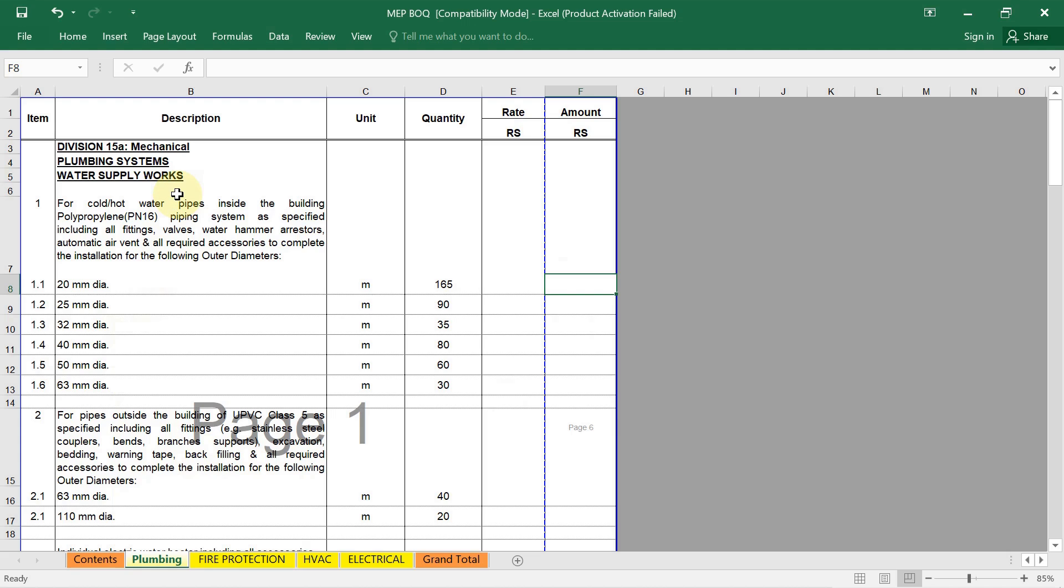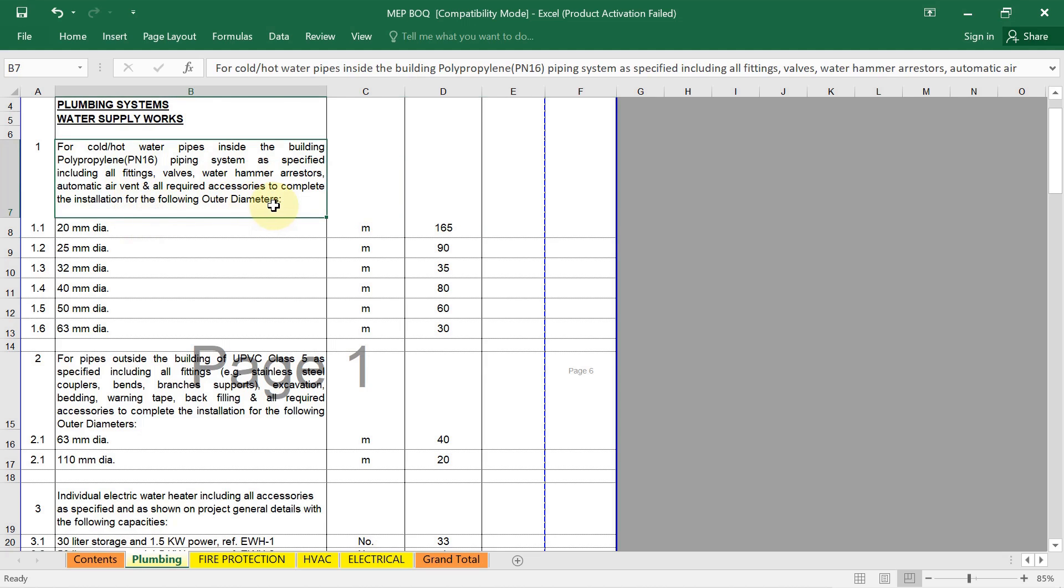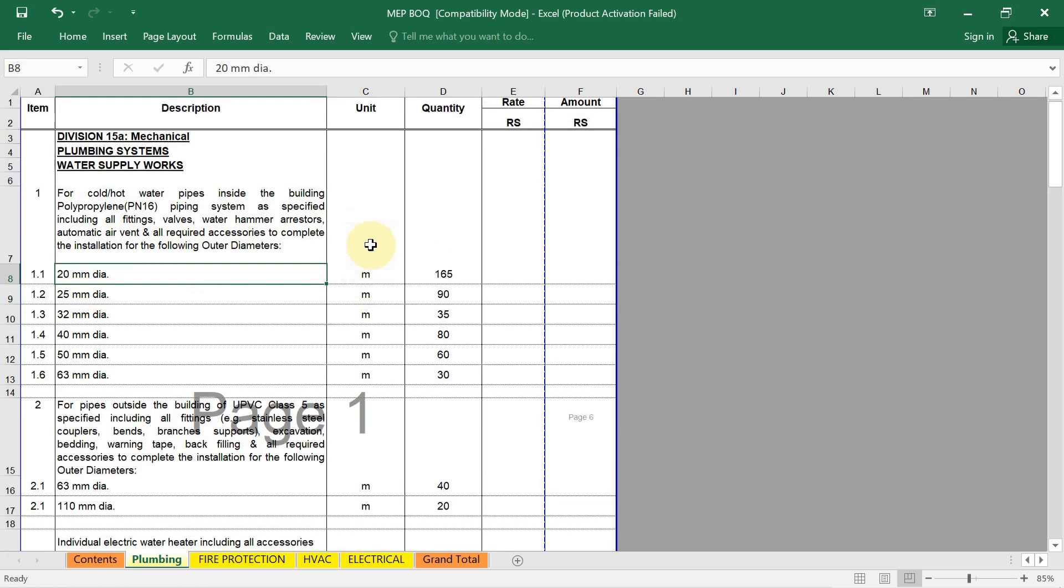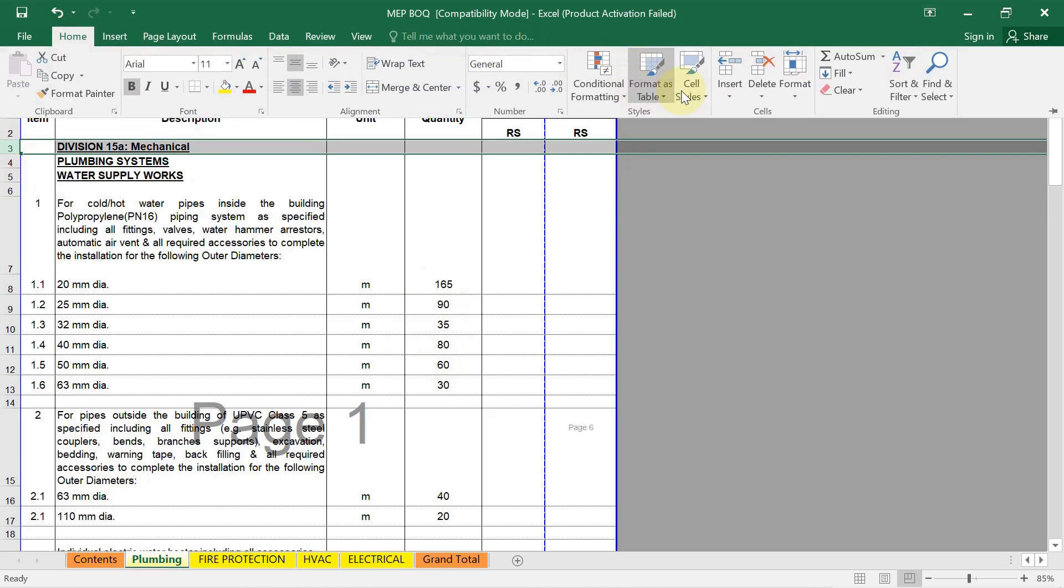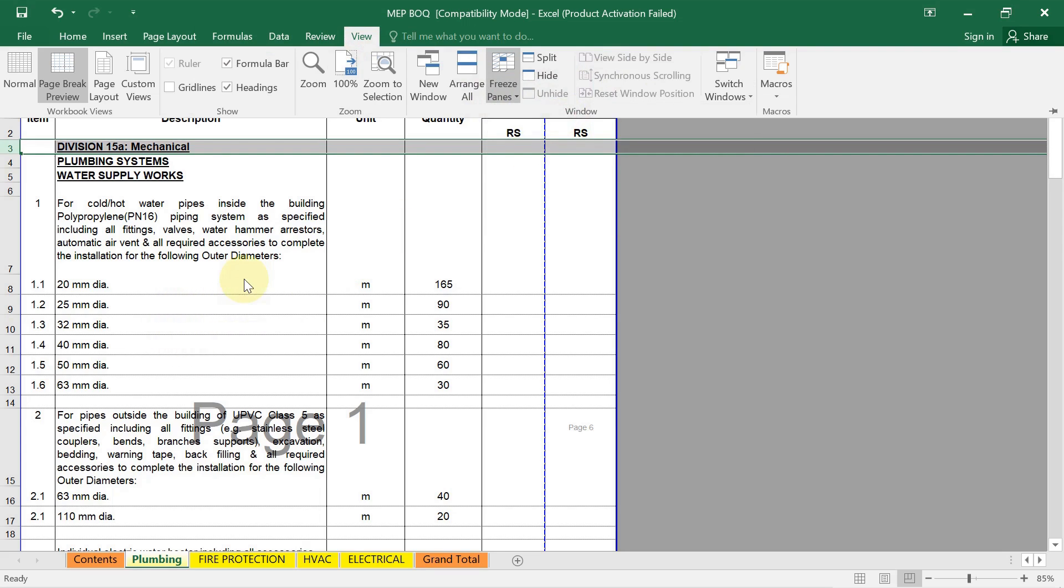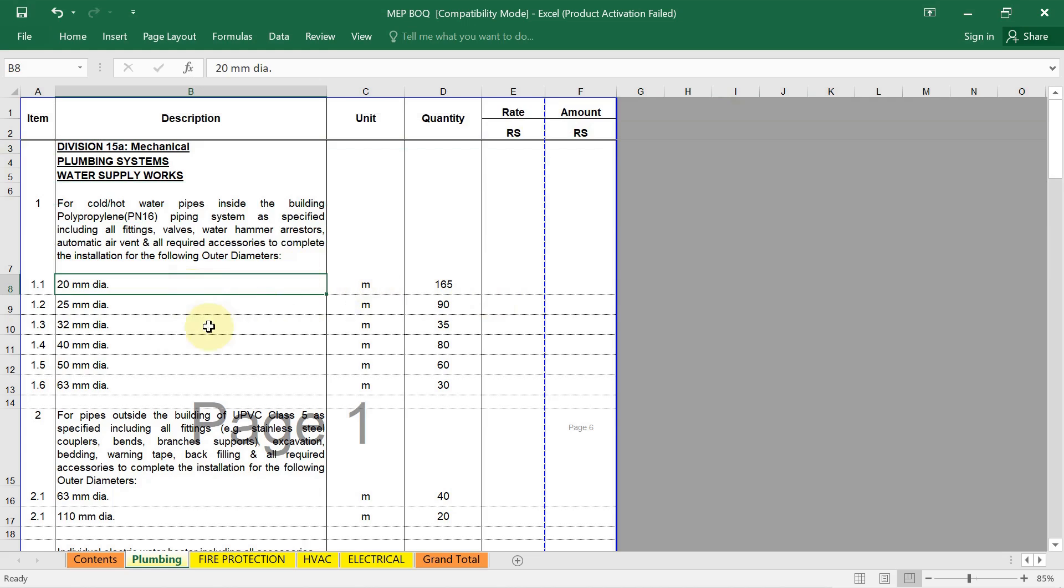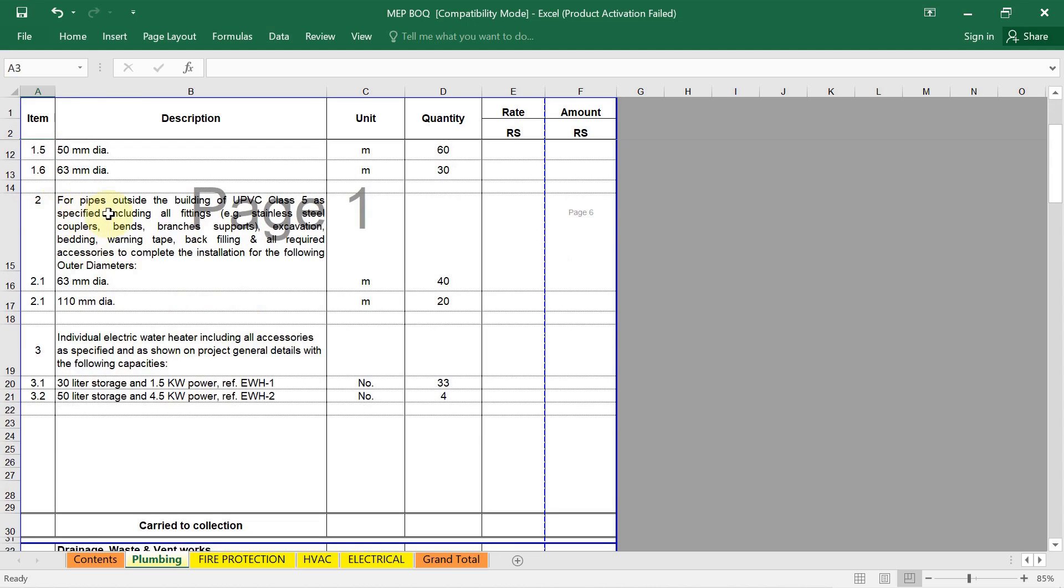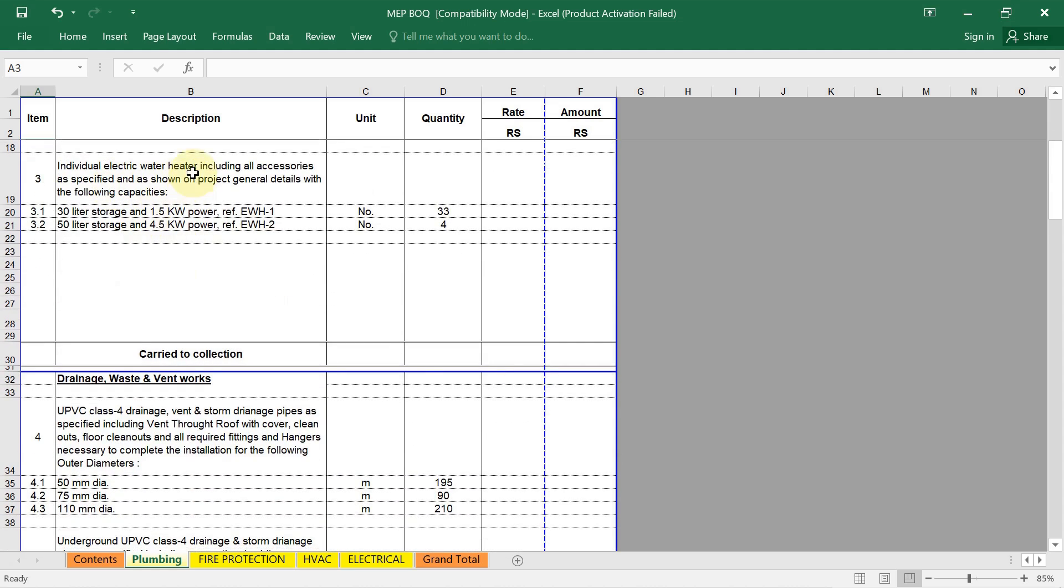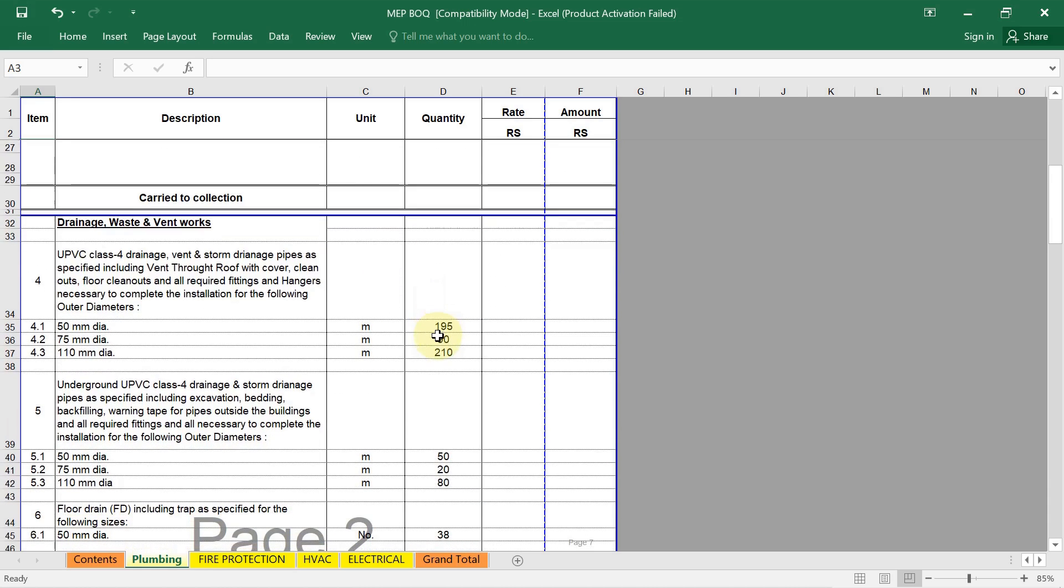Here you can see the sample BOQ structure for plumbing work. This is the water supply. If in your building you are using cold and hot water supply pipe, means domestic pipe, based on their diameter, the main target is what? We need the quantity. Once you will get the quantity, based on market price, you will get the unit rate, everything. How to calculate the material takeoff quantity for pipe, everything I have discussed. Next, for pipes outside the building. Suppose outside building also, if you are running the pipe, their details, their diameter. Individual electric water heater if you are using to supply the hot water, see their capacities and their quantity we have to write in our complete project.